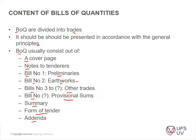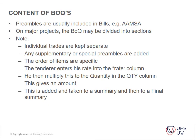This is more or less how the document looks and its layout. Preambles are usually included in your bills — it's basically specifications. Preambles specify that, for instance, if you've got an aluminium installation, the aluminium should be of a certain standard, if it's natural anodised, it should be a specific colour, strength, and thickness. So it outlines the quality requirements for the materials.